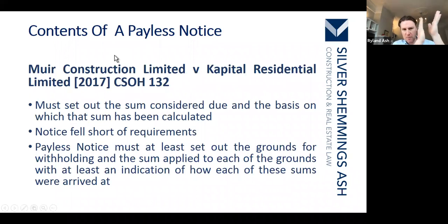Now, in terms of the contents of a Payless notice, as I said, there's some interesting recent case law on this. This Mere Construction case versus Capital Residential 2017 is actually a Scottish law case, but it did set the tone for a number of judgments that were then handed down in the English courts after this. And really, the principle that came out of this judgment was it needs to be reasonably clear from the document submitted what its intention is.